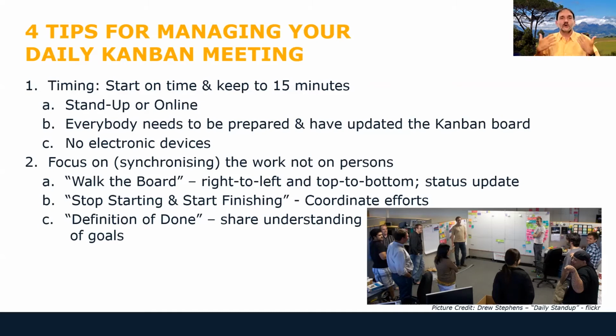But very soon, when you're starting to get into a team board, you should really not go with these questions, but start walking the board, which means you're starting from right to left, from top to bottom, and the person on the right topmost starts with a status update and says what they will do to move the task or the card further. And the biggest thing here is the concept of stop starting, start finishing. So we should really say, what can we as a team do to get that card further to the right?